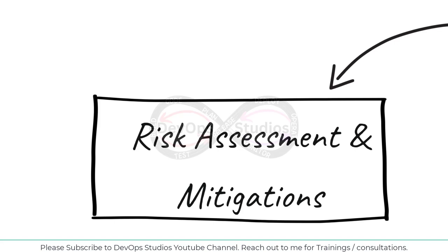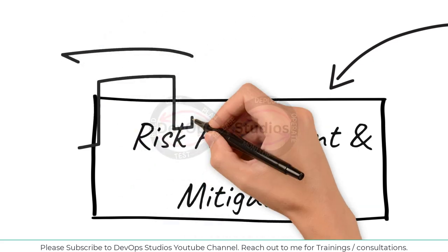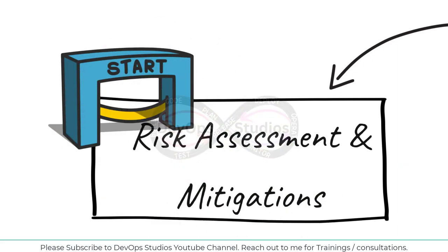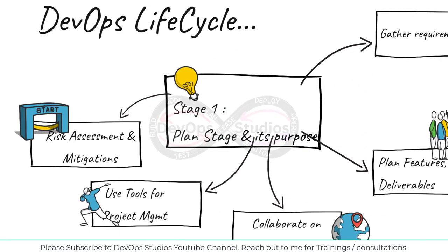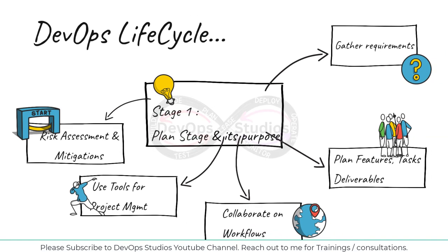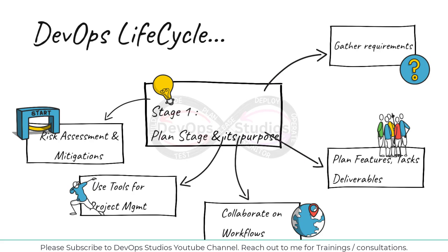So when we face these kind of tight deadlines or resource limitations, what happens is we develop mitigation plans, right? We allocate buffer time, we increase the team size. And for example, a risk could be integrating with third-party apps that may delay the deployment. And what is the mitigation for that? So we conduct early testing and prepare fallback options. So these are the risk assessment and mitigation.